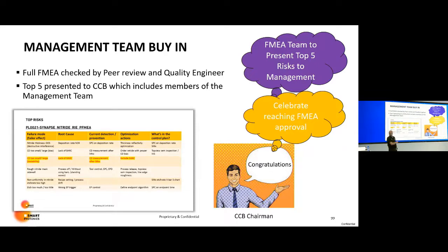And we take the top 5 from the FMEA and discuss them in detail, and that gives a sample to the management team, to the decision makers, whether or not the FMEA is up to standard. That makes it much simpler. Before I came, we did the whole FMEA, which is far too complex. But if you take the top 5, you can get a feel for it.